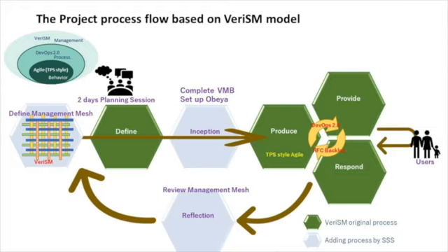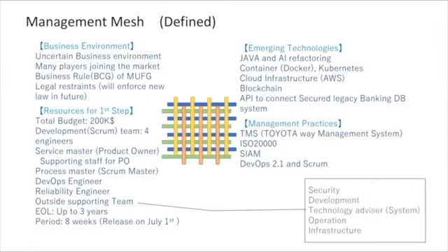The define process aims to create the product plan, such as defining the business process, defining the UX design, designing the functions of IT services, designing the operation flow, SLA, and infrastructures, such as runtime, deployment pipeline, test environment, and development environment. The major activity in this process is to hold a 2-day planning session and define the items. What should we do?